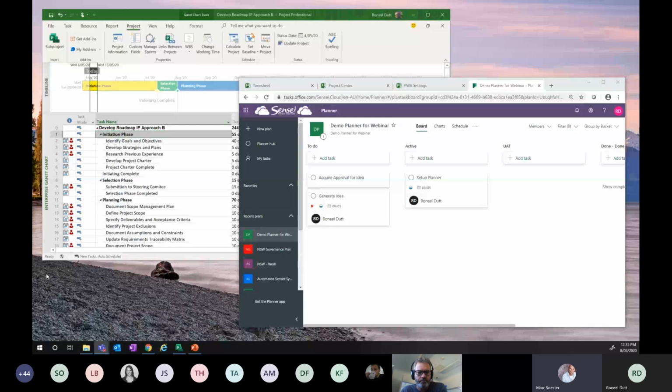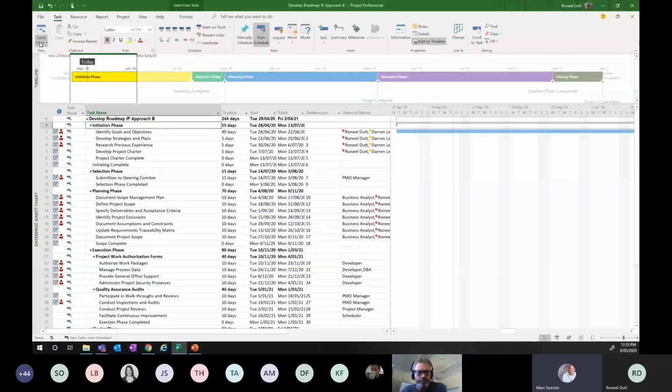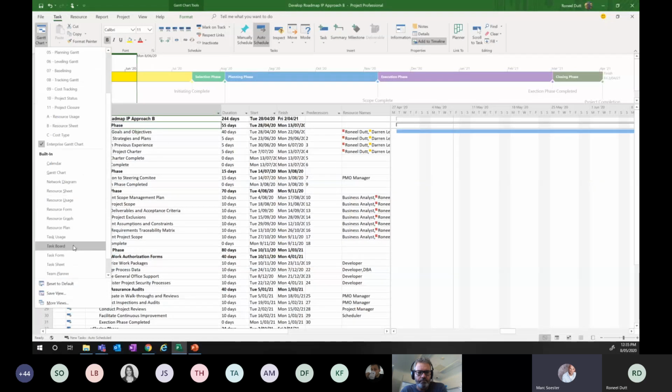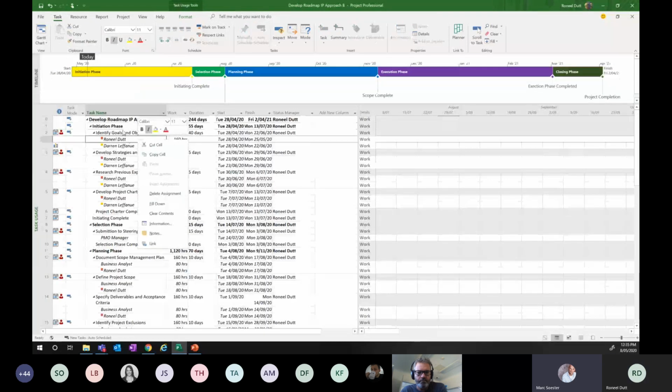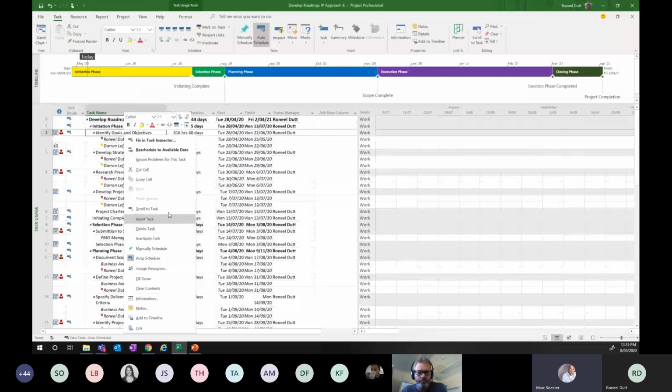So I can say in a schedule, hey, Ronil, I want you to work 4 hours on Monday and 6 hours on Tuesday and 8 hours on Thursday, whereas an easy task management tool like Excel or even Planner doesn't have the ability to determine the progress over time.